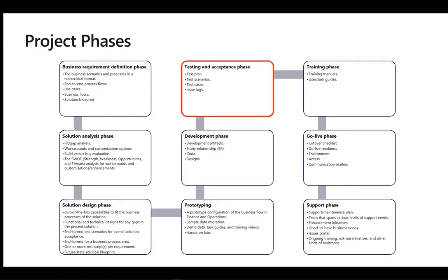In the testing phase of the project, the implementation team should address the following: test plan, test scenario, test cases, issue log. Training phase. In the training phase of the project, the implementation team should address the following milestones: training manuals, user task guides. Go live phase.